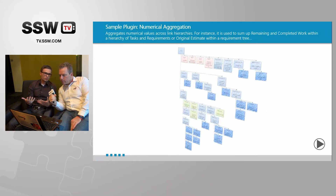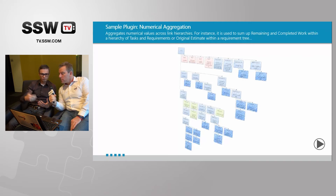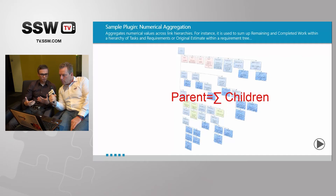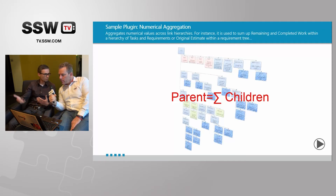The next plugin is numerical aggregation. Imagine a large hierarchy of requirements with effort and estimation fields — you want to aggregate those from children to parent items, to see what's the sum of effort on a feature due to its breakdown into product backlog items. The plugin takes care of all the aggregation and consistency checks, so if some changes were left behind due to TFS updates, it handles it and keeps field values consistent across the hierarchy.